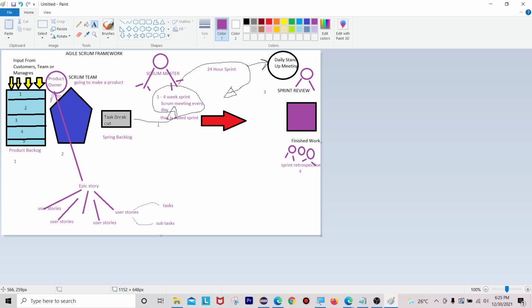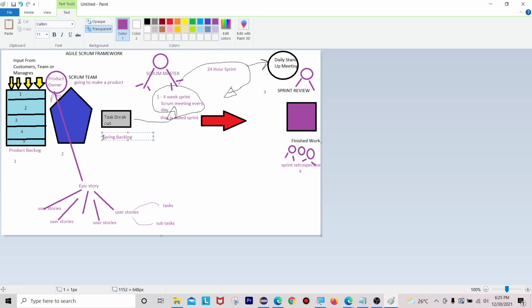Here is the sprint planning meeting. What is called a sprint planning meeting, and when will it come? Here you can see the sprint backlog. The product backlog contains all the stories regarding the product. It is not possible to execute all the stories in a sprint. For that you take 20 stories, and with these 20 stories you are going to make a product in this sprint iteration.